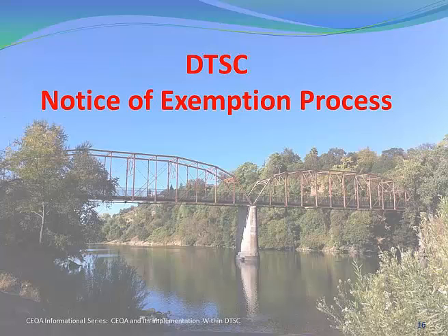The next one is regarding impacts from investigations. We thought the threshold is significant. Well, the threshold is really, is there a potential for an environmental effect on some level? It doesn't have to be significant.